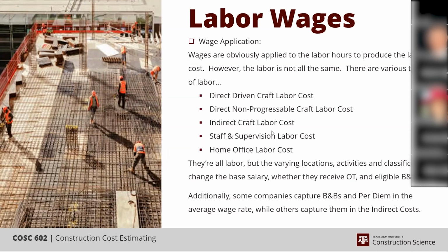But the fact is that the rebar benders worked all day installing rebar, while the crane operator was helping three or four different people throughout the day. Another one is scaffold builders. They're helping multiple different locations. In my opinion, they are indirectly supporting direct craft, but everybody agrees that they're a direct cost these days.